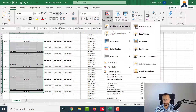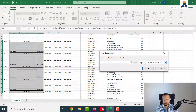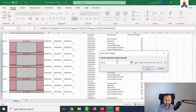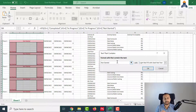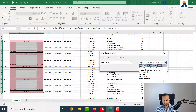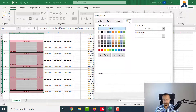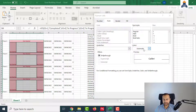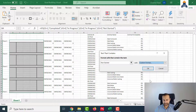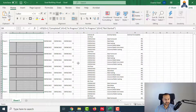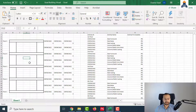Another rule: text that contains 'not started'. There will be no color for not started, but I'm doing the conditional formatting so it can remove the text if the cell has 'not started' value. Custom format - the filling will be no color, and the font I want it white. OK. So now it's done. I have done the conditional formatting.